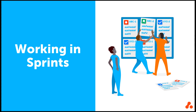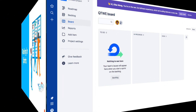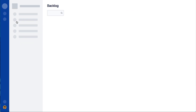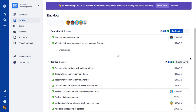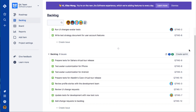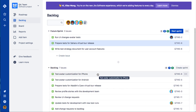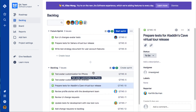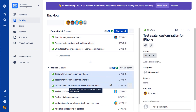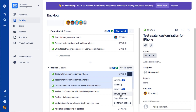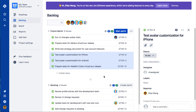Let's walk through building and starting a sprint in your next-gen project. In your Scrum project, click Backlog to access your project's backlog. Move items from your backlog to your sprint — you have a couple of ways you can do this. You can drag your items one at a time, or you can shift-click to select multiple items and drag and drop to your sprint. You can also hover over an issue and click the ellipses menu on the far right, then select to move to a specific sprint or to the top or bottom of the backlog. Now that we have the issues in our sprint, we can start our sprint.